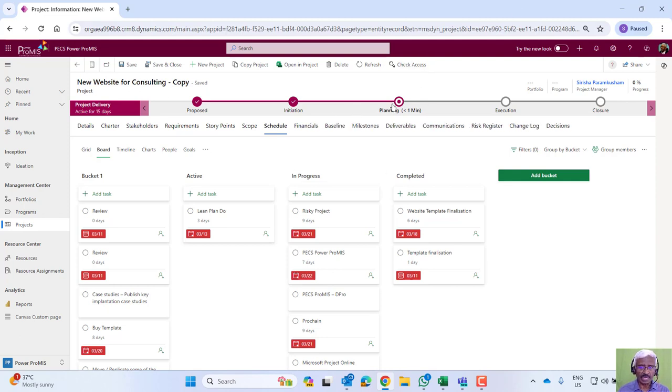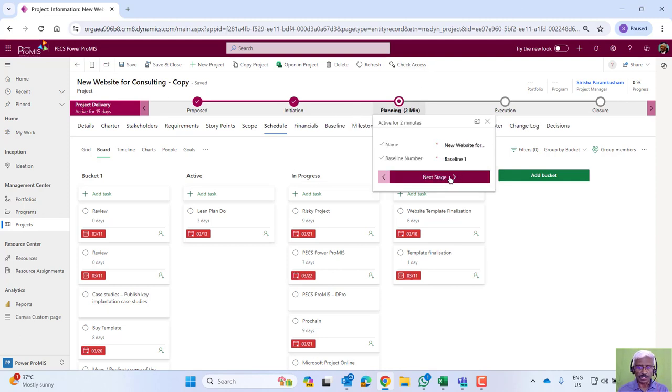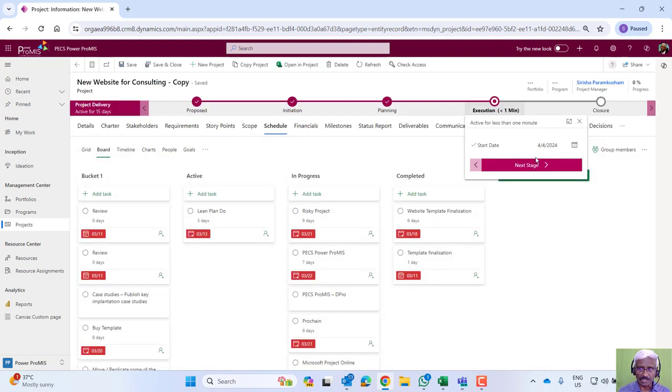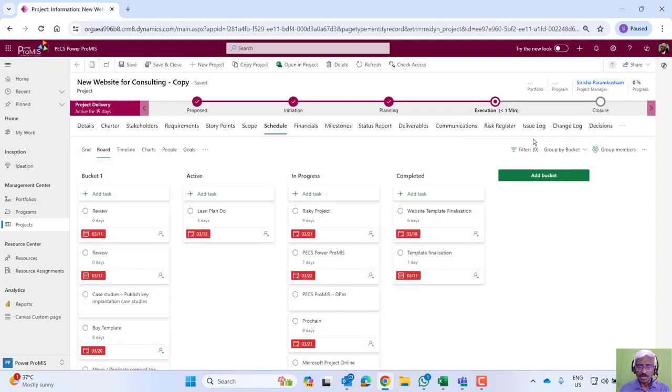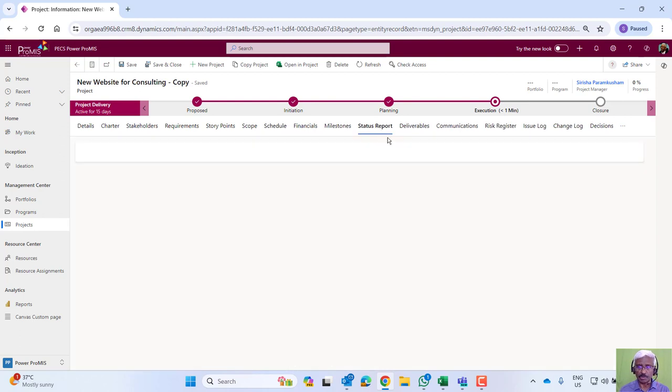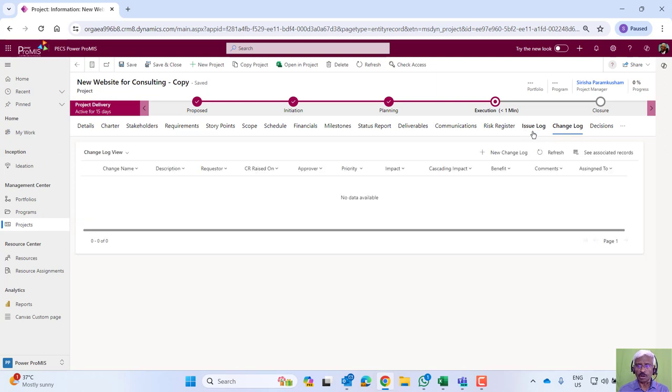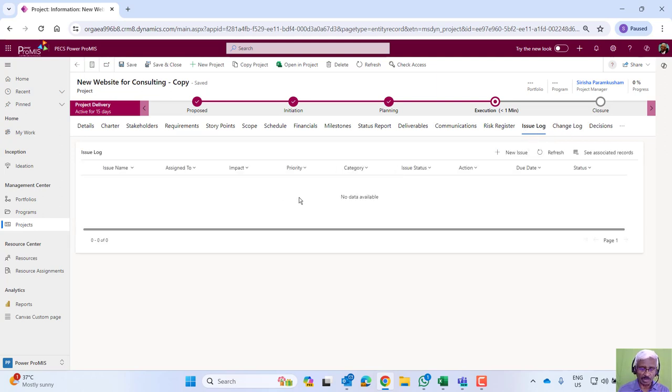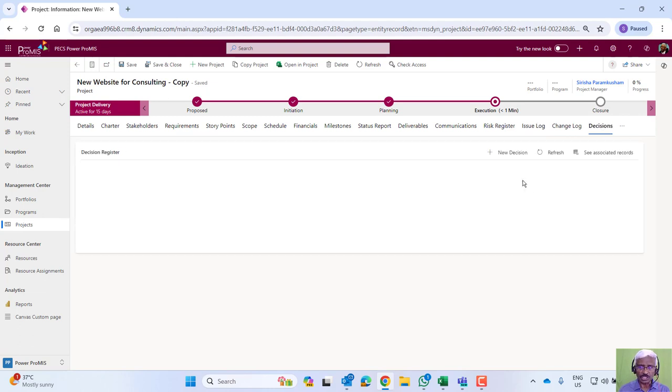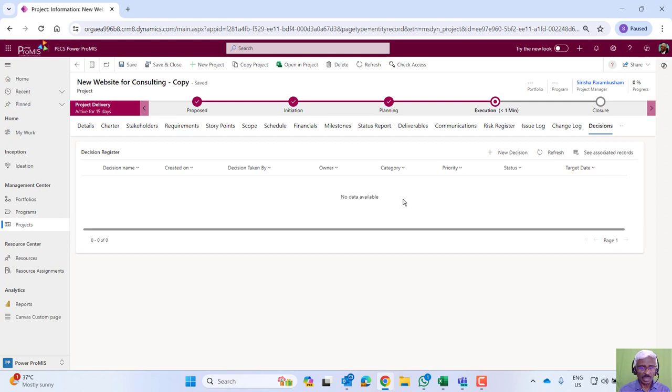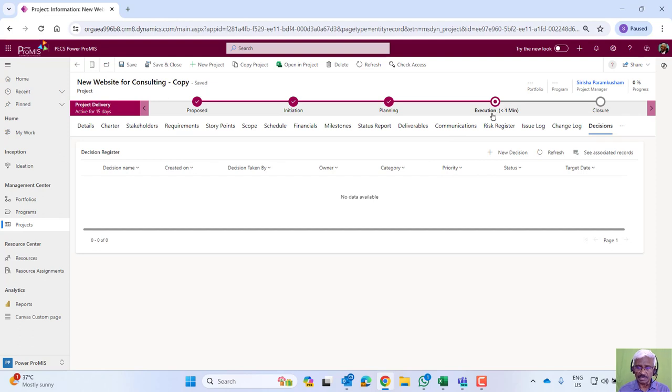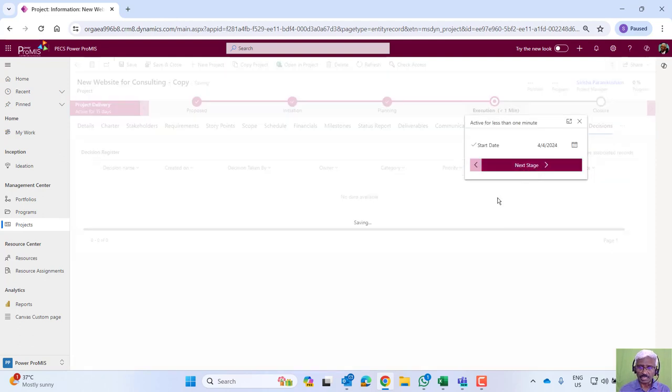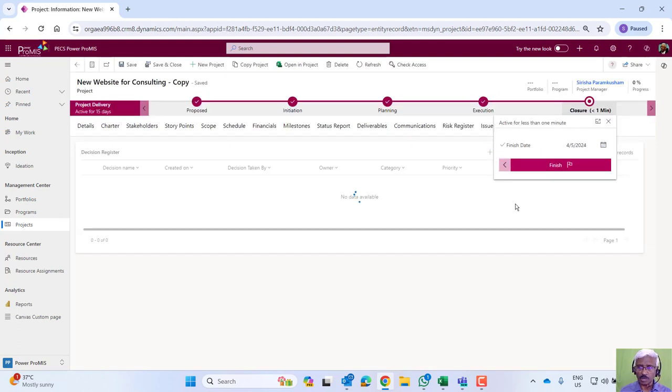Having the baseline, when we move into execution, we can move into the next stage. Here, a few more tabs get added in terms of status report, change logs, issue logs. The project manager and stakeholders need to manage time to time. Any meetings, the decisions arrived, can be tracked through a decision log. The project will keep going. Once the deliverables are completed, tested, accepted, we can bring the project logically to a closure.